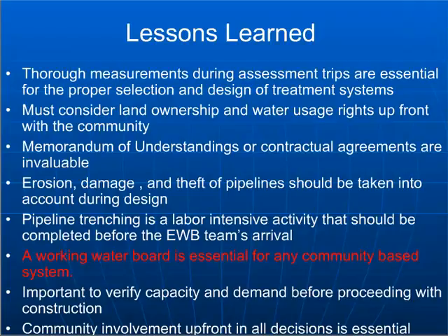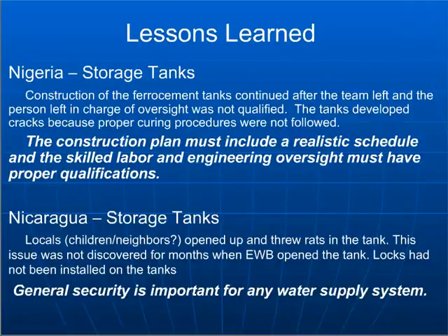The other thing that's very important, if you're involved with a water distribution project with EWB, is developing this memorandum of understanding with the community. That's just an idea of getting everything out on paper, out in the open at the very beginning, to make sure that they understand what's expected of them, you understand what they're expecting of you, and making sure that those two groups are working on the same page, and everybody knows what the other person is responsible for.